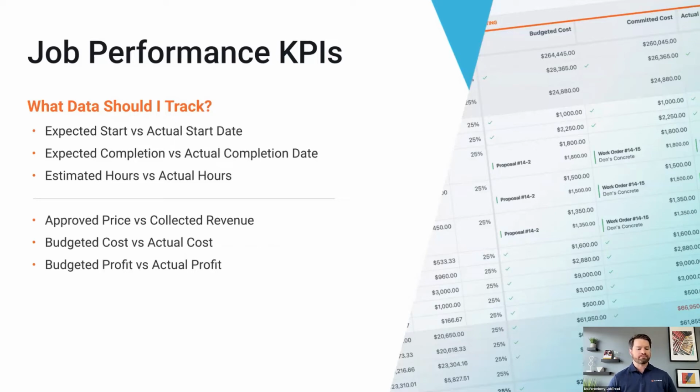flow along the way. And then from your budgeted cost, whenever they signed off on that, whatever budget you had put into that for your cost, set that as the final budget, and then track all of your actuals along the whole job to understand how we are tracking against our budget. With JobTread, we project how much this job is going to cost you. We show you a projected amount. We show you your cost to complete. We show you your actuals. So we give you all of this data so that you can in real time better manage the job cost to ensure that you're going to hit your target profit margin.